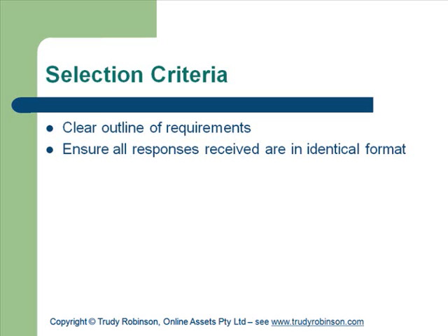So, for example, if you were going to send out a statement of works or an invitation to tender to an electrical company to fit out a high-rise building, then you would say, give evidence of similar projects, like a high-rise, 5 levels, 2-bedroom, 2-bathroom fit out. Then you'd say, show that you have the capacity to have the tradespeople required to do this within the time frame, etc. So you'd actually go through this and get them to answer the information under the format and in the terms that you want it back.